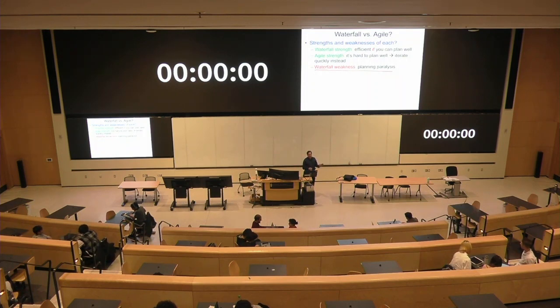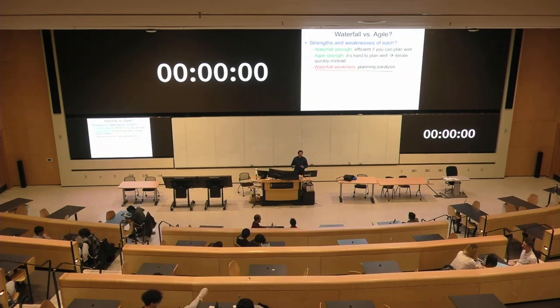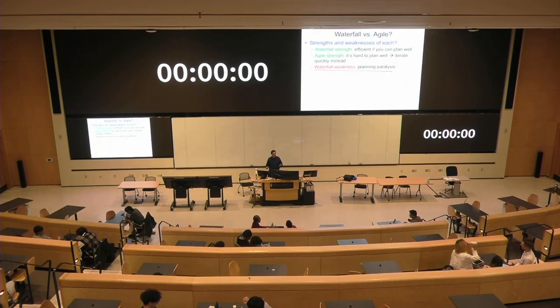They spent a year with their key engineers trying to plan how that software would work, and it was just too complicated. Even their best engineers could not plan out a project that complicated. After a year, they realized this is too late, it's not going to be ready in time for the next chip, and they basically started writing code. So this is an extreme example that cost literally hundreds of millions of dollars. It's a really expensive mistake that actually had a big impact on some people's careers, because that kind of mistake sticks to you for a while.